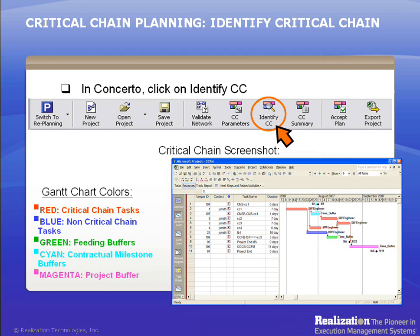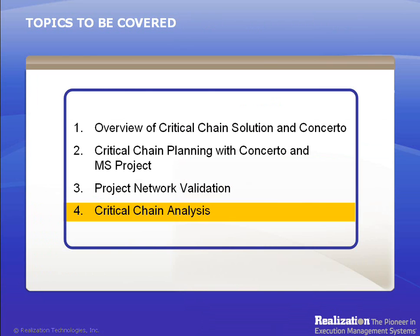Lastly, all tasks converge at the project end and project buffer. The project buffer has a magenta color. The project buffer in a critical chain plan serves two purposes: first, it aggregates hidden local safeties in a visible buffer to cushion uncertainties; secondly, it is used as a measure in determining task priority. After Concerto gives you a remake of your project network, you'll need to analyze the network and possibly do some final touch-up to ensure it meets your goals.